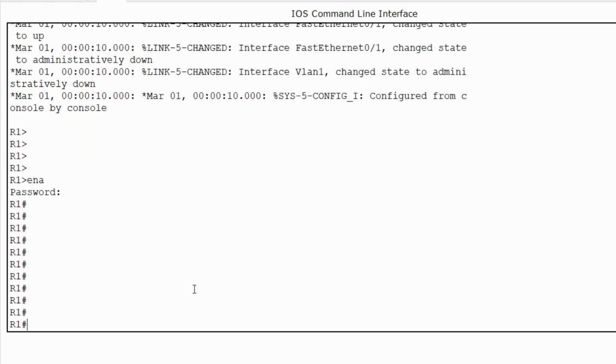Not only for NCS, for any type of device you are going to upgrade, you should first ask the local support who will be there. They should have a ready pen drive with the image you have put there, and a console cable, and everything should be tested beforehand. Sometimes you lose the connection and need console access, and you ask the local support engineer for the console, but you don't have a console cable. What will we do? Or he has the console cable, but the driver is not installed properly on his laptop.